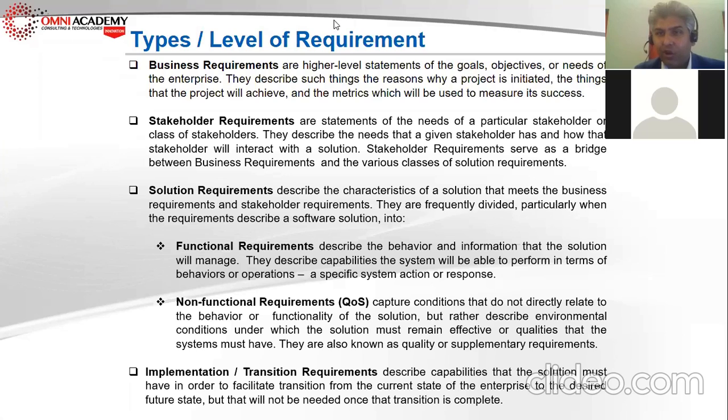So if that non-functional requirement is not delivered, which is 30 seconds to generate the report, maybe the customer will close the browser and leave. That will fail the whole project. So you have to identify those non-functional requirements and link them to the functional requirements, so that whenever you discuss the priority or deletion of a non-functional requirement, those requirements stand out. This is a very important point.